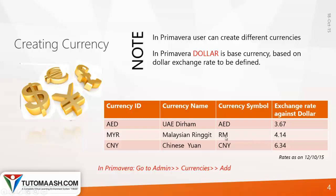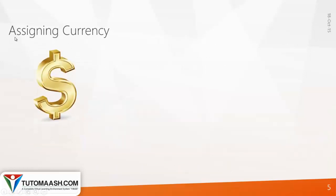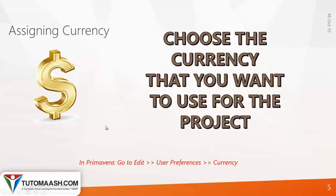To find this, go to Admin, Currencies, and click Add. After creating the currency, you have to assign it to your project. That is our third step. To do this, go to Edit, User Preferences, and choose Currency.